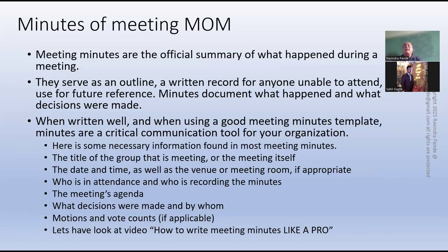And action points are assigned to somebody, a specific person, a specific designation, or a number of persons or designations, so that we can track them and build traceability. And that's the beauty of an auditory artifact. You have to have that traceability. Who started, who discussed, who talked, who committed to do these things till what date. So there will be an action end date. If there are any dependencies, those are also mentioned.